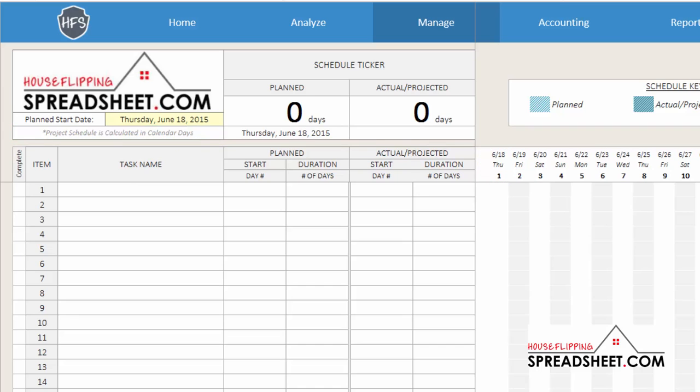Once you've established the planned start date, you will input your first project task, which will start on the planned start date or the first day of the project schedule.